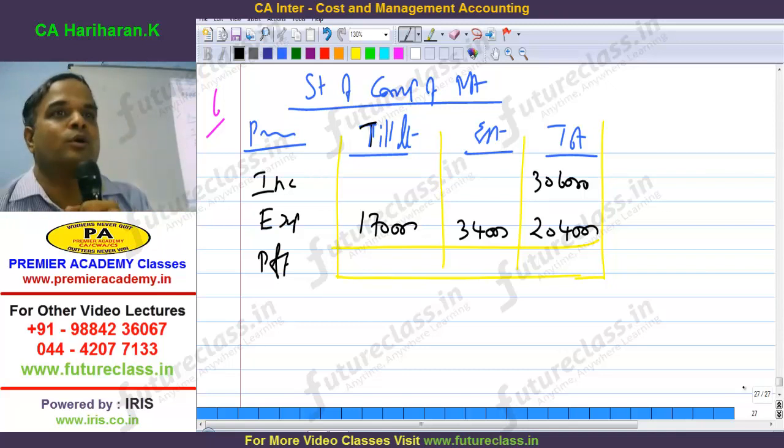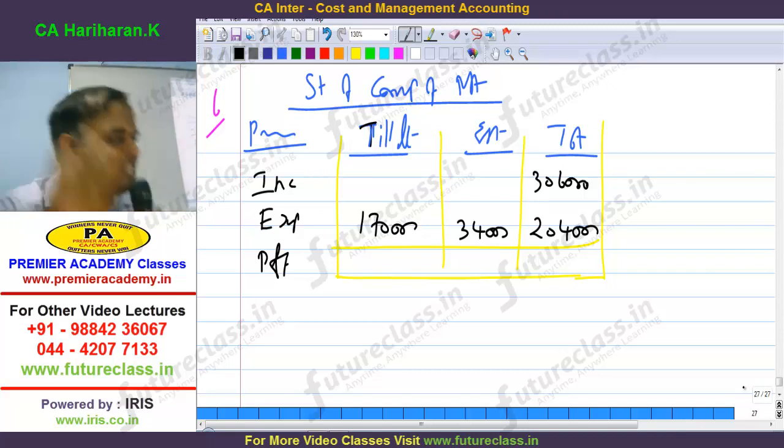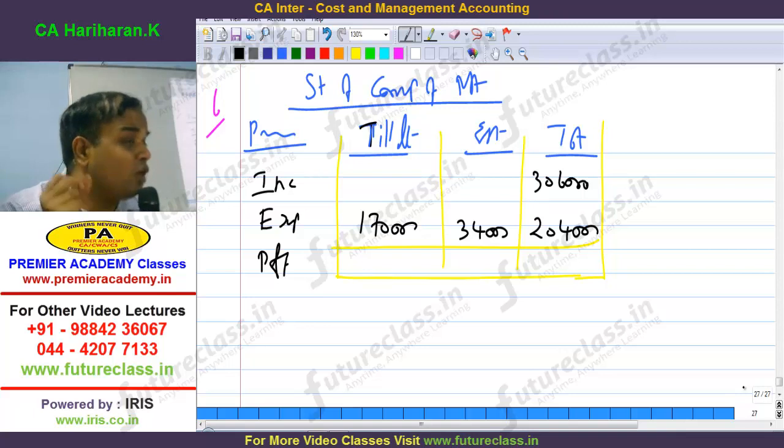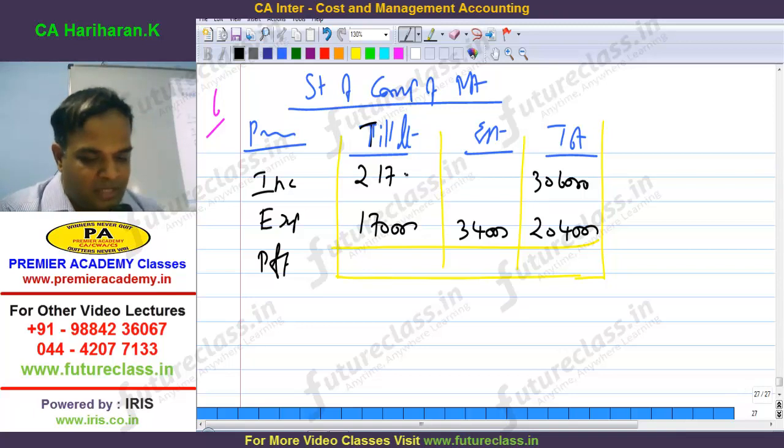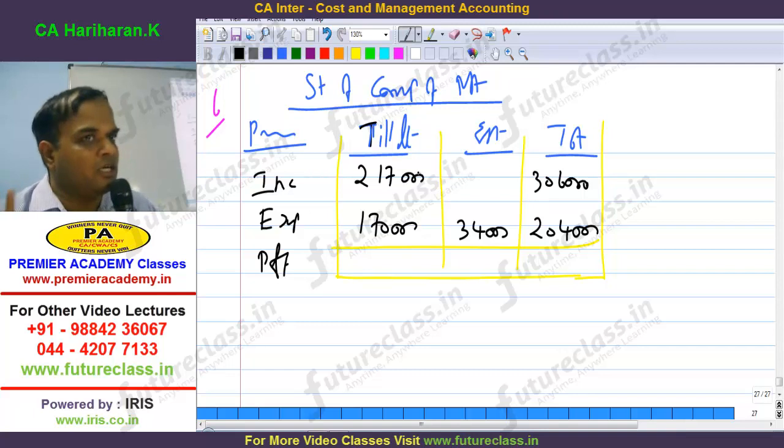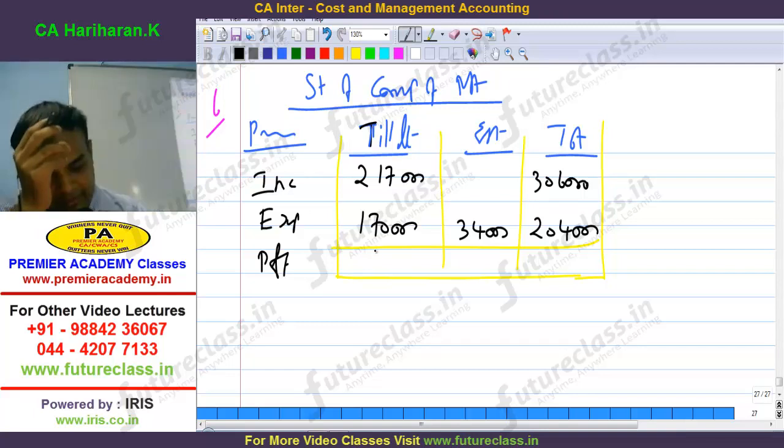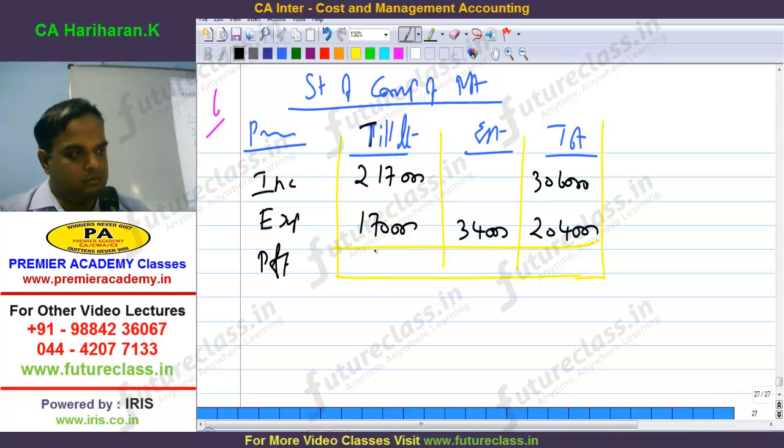Expenses over. What will come on the income side? Work certified and work uncertified is called income. Cash receipt will not form part of income. Therefore, how much? 17. Now got it or not? Now, profit for the current year till date. How much is the profit?